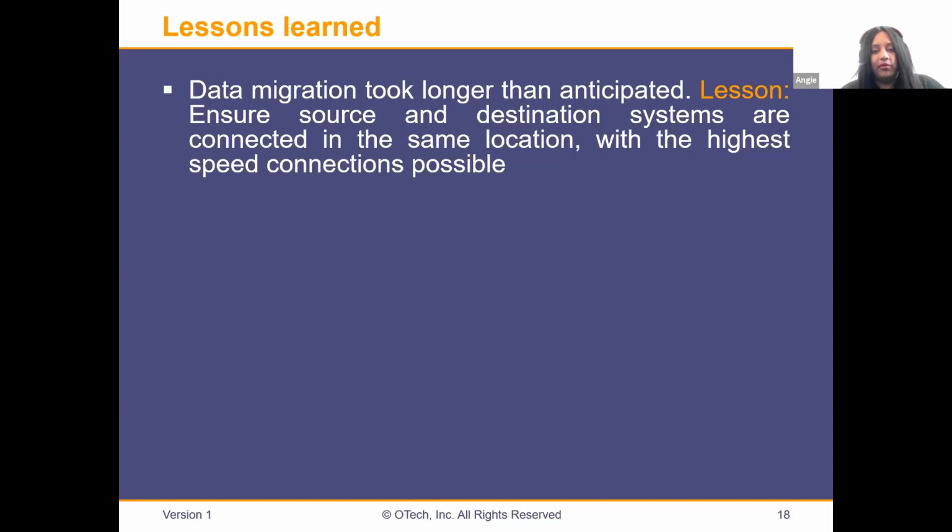By the end of the 12-month mark, a hard date was given. At that point, the project was tied to the end of contract for the former repository A's vendor. And there was significant operational cost savings to be realized by completing the project.